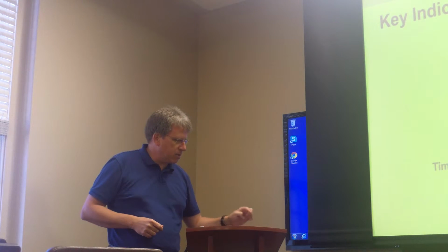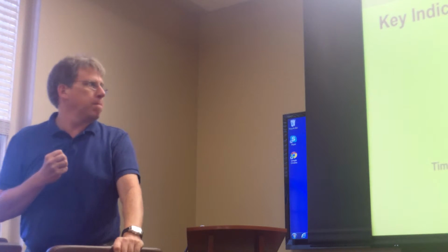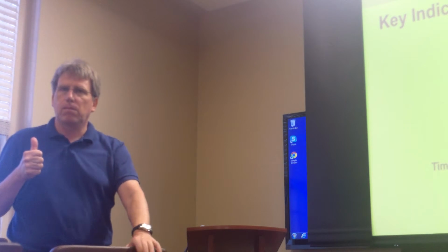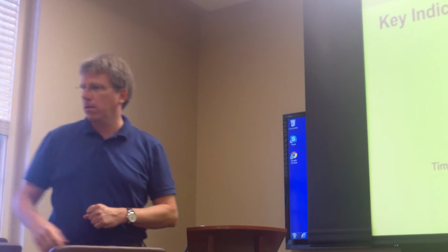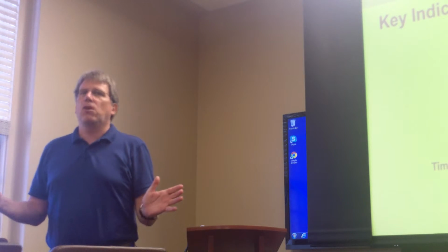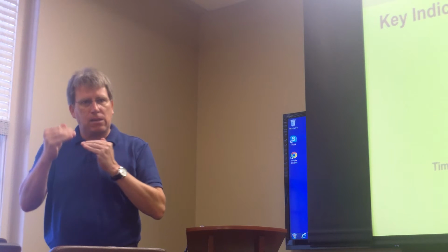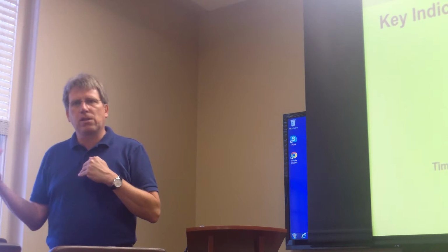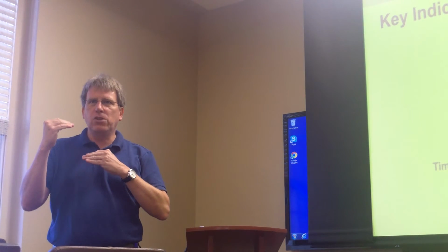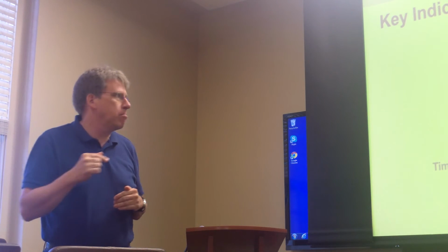Okay, but these 4 indicators can be interchanged. We will see later on when we go to the planning of a project that we have to have at least one of these indicators open when starting to plan a project. We cannot fix all of them. I cannot go there and say, hey Gert, you have $1,000 and please set up a complete new car. That's obviously impossible. But looking at some projects, there is always some kind of a race to get the project. And in this race, some external companies may try to get the project by reducing budget more and more, reducing time more and more, and there is some breaking point where the project cannot be carried out anymore. So be aware of this.